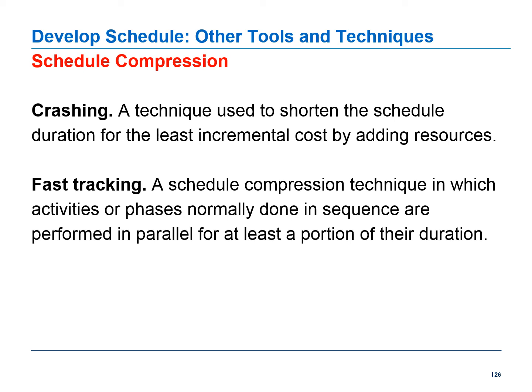A helpful technique is the negative float analysis. The critical path is the one with least float. Due to violating a constraint or imposed date, the total float can become negative.